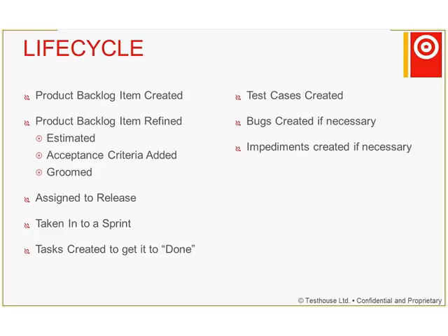Part of getting things done is creating test cases, perhaps for the current sprint or perhaps for items in a future sprint, and also part of getting it done is recognizing faults which can't be cured in this sprint, faults which are maybe the low importance faults, or maybe they're faults found in work created in previous sprints. So we have to create the fault reports as required, and we have to manage impediments, things which stop us from doing the work properly, and that might create new backlog items.